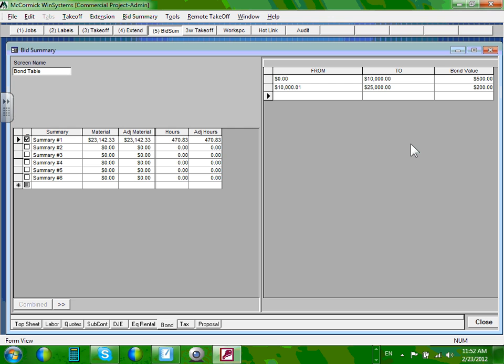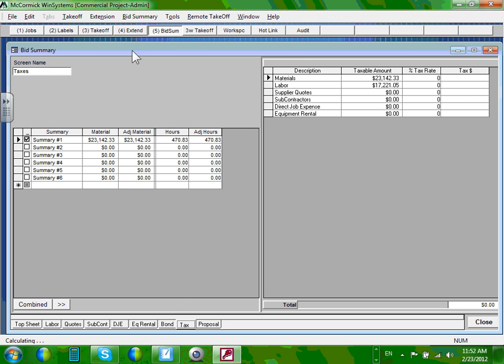Good enough? All right. Taxes. Let's go to tax. We tax dead people and alive people in Minnesota. Rightfully so. We're a high tax state here. Now, am I going to assign in Minnesota? We tax only material. We don't tax labor. Can you guys see when you go to tax? So what's the tax? 7%, 6.5? I thought Minneapolis was 7 something. 7.25. Let's say 7.25. I think in Minneapolis it's 7.25.